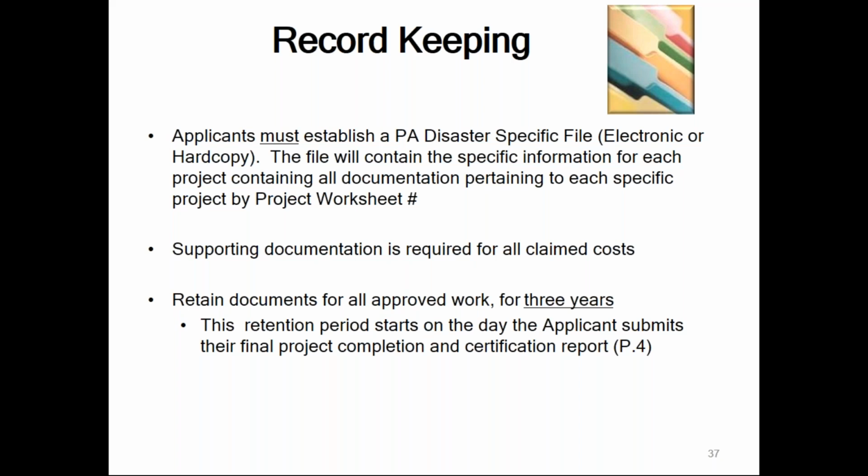with a brief explanation as to what they're doing. These donated hours and the costs associated with these donated resources can all be combined and used to offset your local share of your category B project. So it's very beneficial for you to track donated resources.